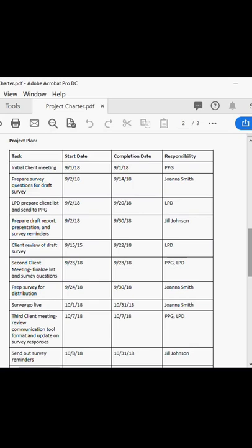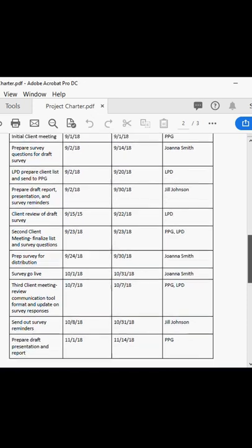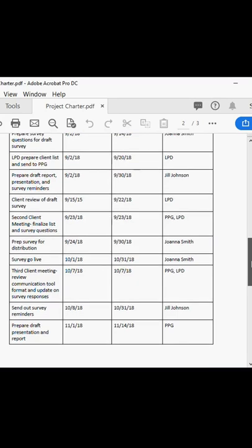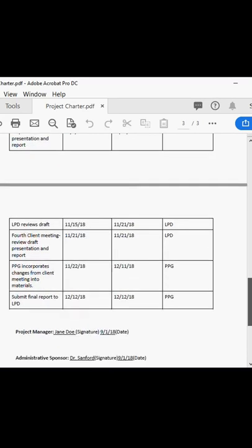So in the project charter, you want to get into a little more granular detail about all the steps that are required, as well as whose responsibility it is to accomplish each of those steps. And it's a really helpful exercise to walk through with your team because you will likely find as you have those discussions that some folks may or may not know what their role is, and it's just helpful to have the discussion and define who's doing what and by what dates.